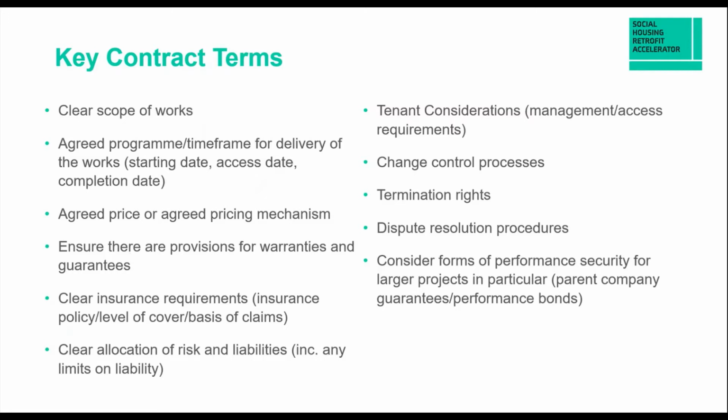The final few then, change control processes. So if you need to vary the contract for a particular reason, whether it be the scope, the amount, anything like that, how do you do that? How is the change dealt with? How is it quantified? How is it agreed and ultimately implemented? But how robust and detailed these change control processes will ultimately be dictated by how complex the project is.